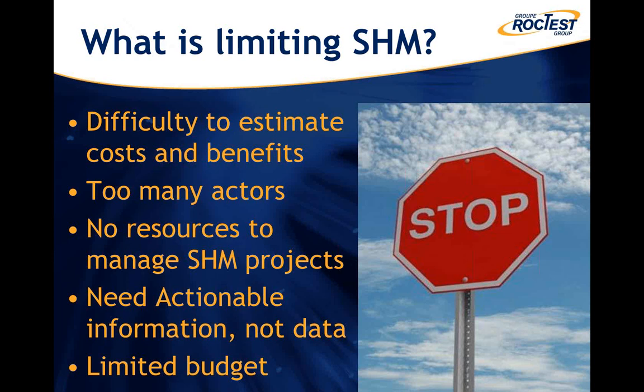Another limiting factor is sometimes the large number of actors that are needed to carry out an SHM project. You need a supplier of sensors, you need someone to install it, you need someone to analyze it, etc. So we have introduced, for example, the SHM Live concept to reunite all these actors under a single, let's say, coordinator, so that there is only one interface to the owner.